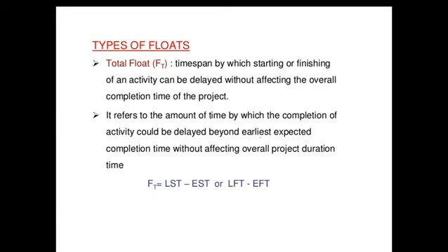This difference can be termed as total float. So, total float is the difference between the maximum time available and the actual time required to perform the activity.